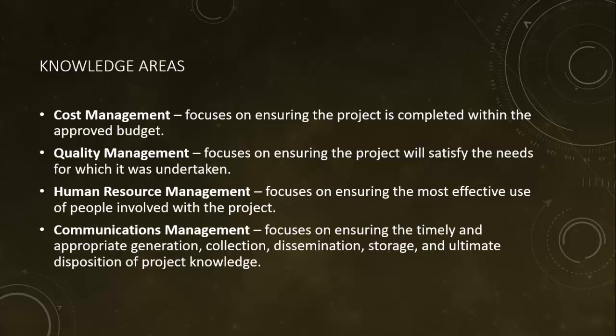Good communications is not only accurate, in other words, giving the correct information, but it's also timely. If I'm a day behind, one day into a 4-year project, my stakeholders don't need to know that probably. If I am 3 months behind with 3 months to go on my project, especially a long project, you're probably too late in telling them that you're behind because you probably aren't going to be able to fix it or get enough help to be able to fix it.